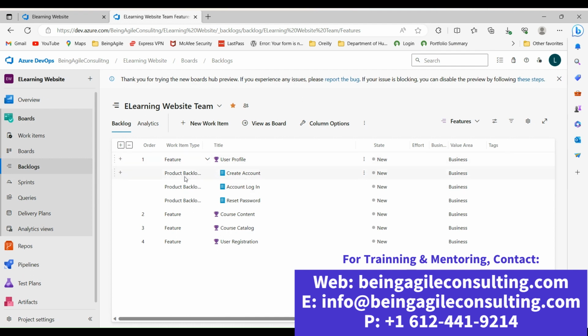The reason why I really love this approach, I will not just go ahead to start creating user stories randomly, which is what most people do, is because once you do it this way, you are immediately linking your items together. You're linking your items following the work items hierarchy from features to user stories to task, as Azure DevOps have it.